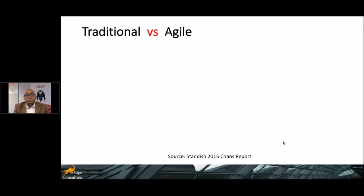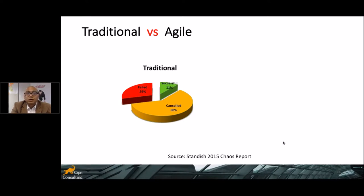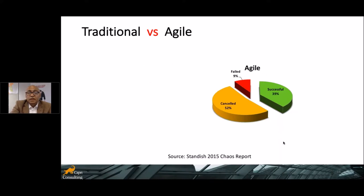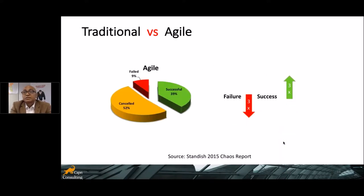Comparing traditional project management against agile, using a 2015 Standish Group report: traditional projects show 60% cancelled, nearly 30% failed, and only 11% successful. In the case of agile, cancelled are around 52%, the success rate goes up to 39%, and failed are only 9%. So failures are three times less and success is three times higher. That is the reason why we should go for agile — it allows you to change direction and respond to changes as the product evolves.